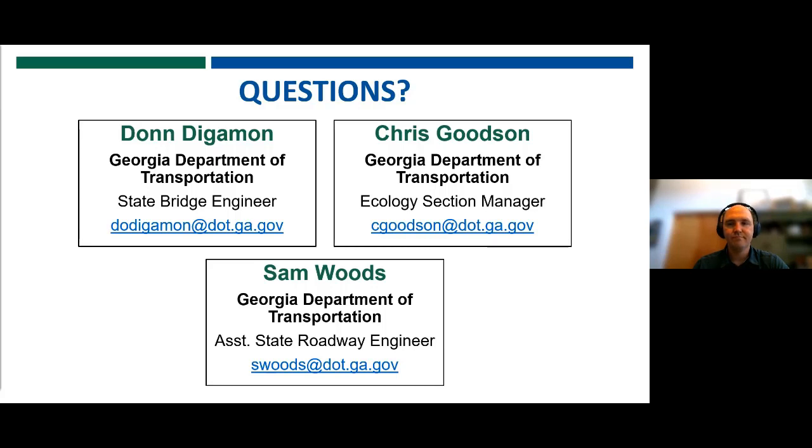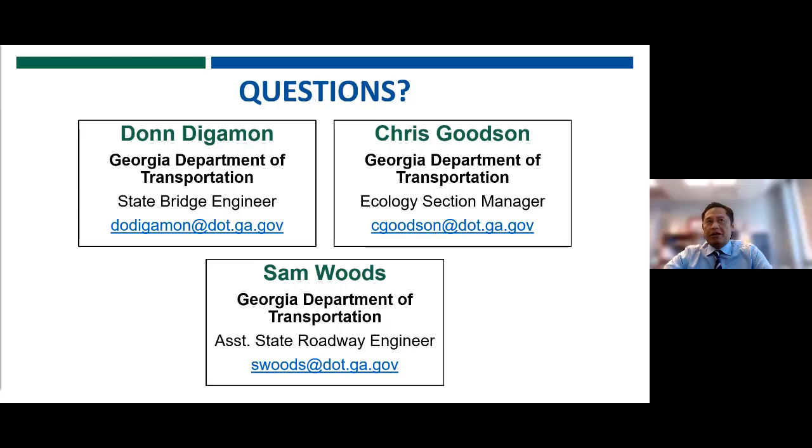And Chris, thanks for bringing that up. Yes, that conversation starts really early for LIBPs at the field scoping meeting. So I would say it's going to be an early start there. The conversations at least are starting. Those conversations should be captured, documented, and as Sam said, along the way you are making sure that guess is being confirmed by each portion of the project team, whether it's designers, construction, utilities, or right of way in this case. So yeah, as early as possible for LIBP, at the field scoping meeting.